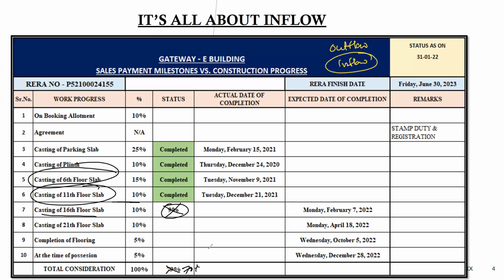So I can generate the demand letter through the RERA to the customer to submit 70% of the amount. Earlier it was not the case, the process was different, but here you need to do all these processes through the RERA, whether you are working in Tamil Nadu, Karnataka, or anywhere else. See how interesting and how complex it is. All this construction is part of your IPP, part of your internal construction business, but it is attached with government regulations.